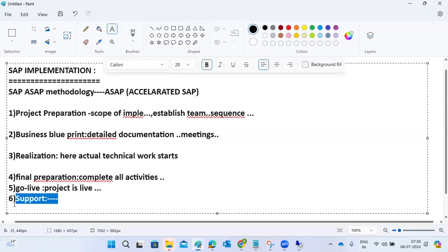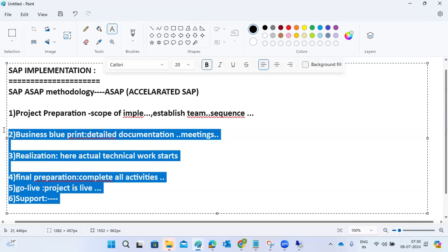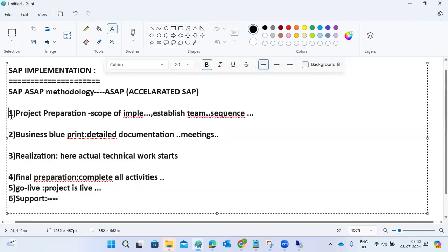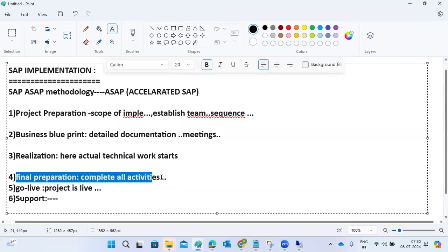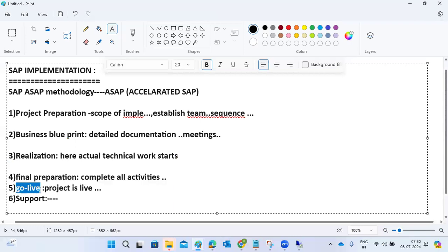All these steps will take maybe 6 months to 1 year for project implementation. So it starts like that. Why? Because we have to follow all the preparation, hiring the team. Customers should be happy and they should agree. The detailed testing will happen here, UAT, user acceptance testing, everything. Once everybody is agreed, only then will the project go live.